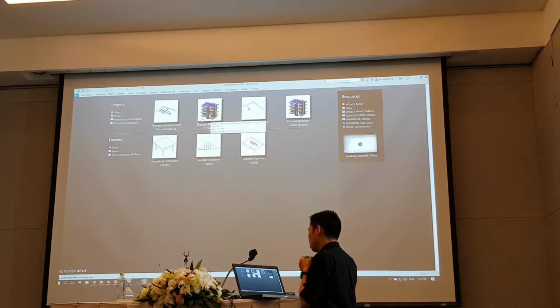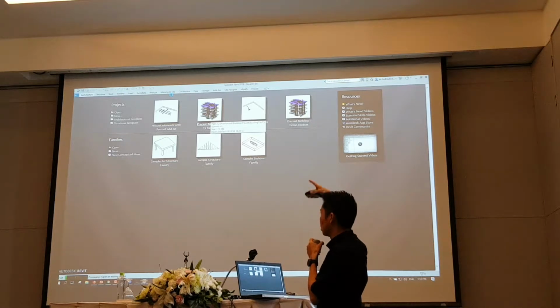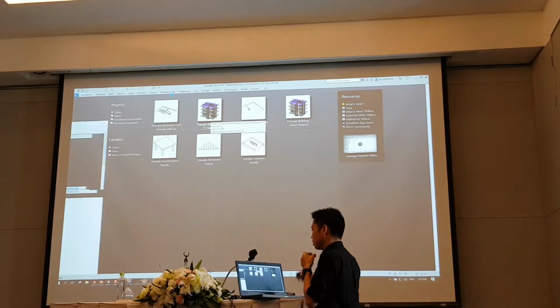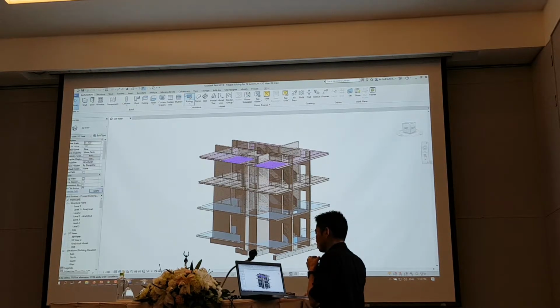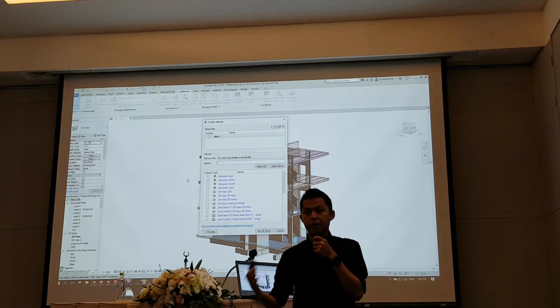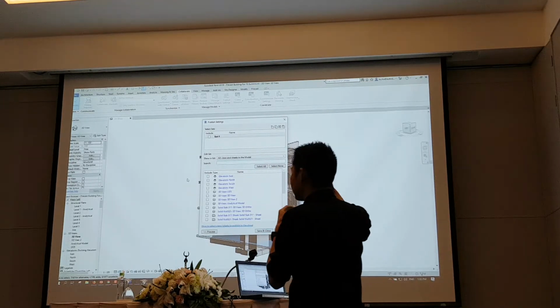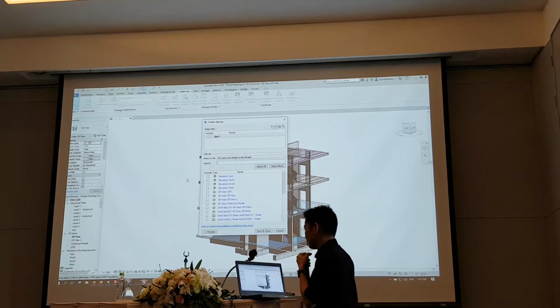Now, if I open up one of the files here, as usual you can go to the Collaborate button, go to Publish Settings, and control that by creating sets. I can create a couple of sets, for example a set for the design phase, or the design submission, BP submission, and so on. So I can set those kind of levels. I can also set it for visualization for certain things. So I can control it from here. Whichever items I tick, it will publish in docs.